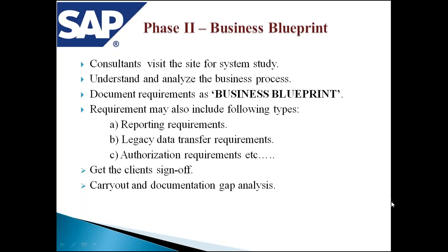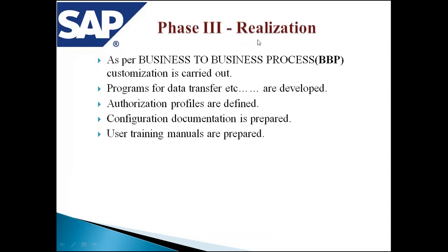So that's all of our second phase, document requirement of blueprints. Now this has got to get client sign-off with his approval, and we have to pull all the data from the non-SAP system to the SAP system, and for that the client should sign off, and we connect the legacy system to migrate the data from the non-SAP system to the SAP system, and that's all in the second phase. Now when you go to the third phase, which is nothing but the realization stage.